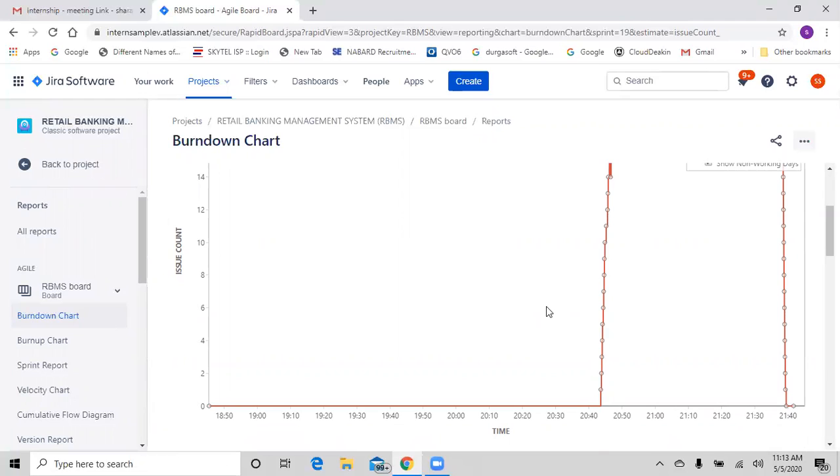See, your graph is representing everything, right? Correct. Okay. So is this a negative issue in terms of real time? Of course not. If you didn't start work, ultimately that will be represented here. Why has the burn down chart been going down? As I told you, I even asked you in the previous diagram as well, right? Correct. So if you are not working, the graph is flat. That represents you're not working on any user story so far, for the first couple of hours. Yes.